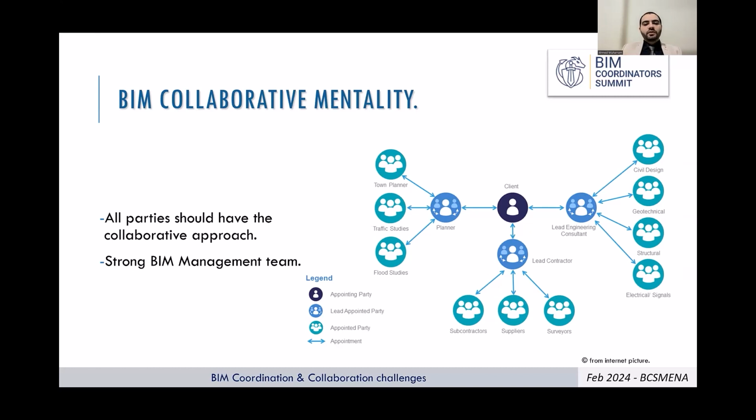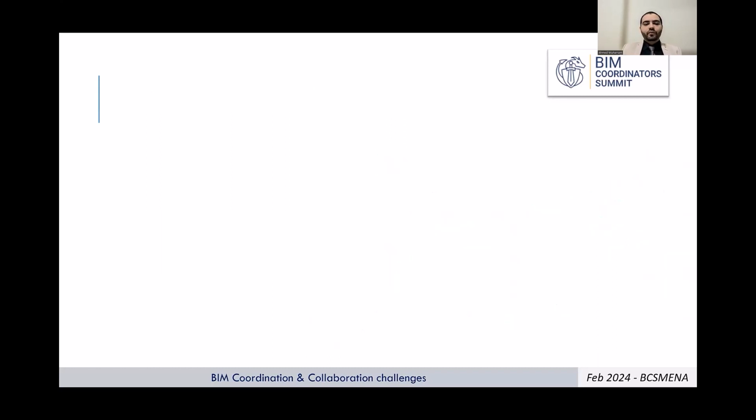You cannot manage the BIM by yourself only with a minimum number of team members. In large scale projects, this will fail. You have to study your team. If you don't have enough team, you have to delegate to a project management consultant or project management consultants according to the scale of the project.